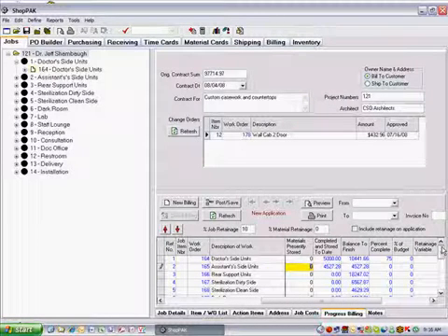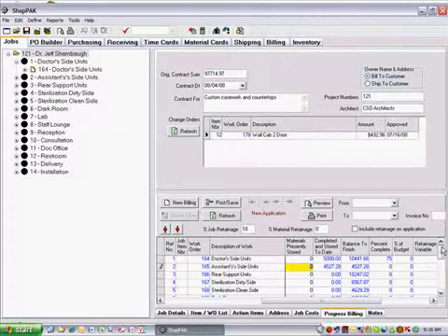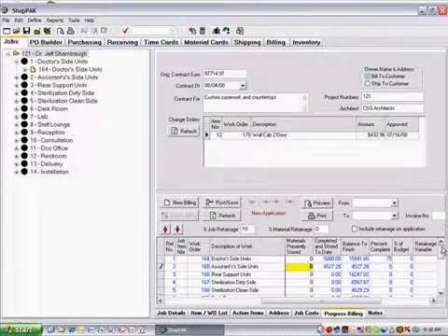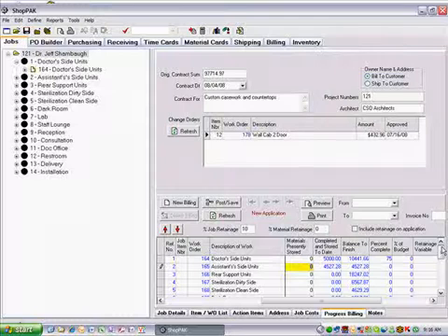If the application item is based on a work order or job item, as they are in our example, ShopPAK includes both the % complete and % of budget percentages for the work order or job item. Use these percentages to help you determine the correct % billed percentage. The % billed should be close to the progress tracking percentages.